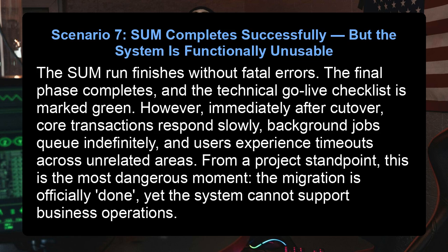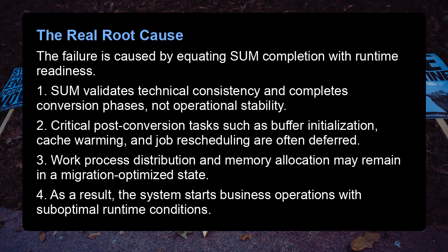From a project standpoint, this is the most dangerous moment. The migration is officially done, yet the system cannot support business operations. The real root cause: the failure is caused by equating SUM completion with runtime readiness.